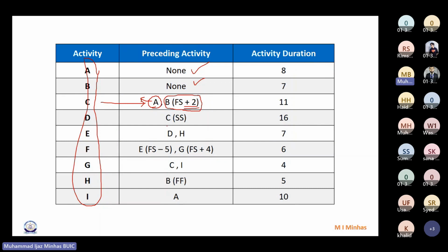Okay, so that means when we introduce a delay between 2 activities, we refer to it as lag, and it is shown by a positive value here. And similarly, in this case, it's a negative sign with 5 days, that is a finish to start relationship. And this -5 is indicating that we have introduced a lead. And what do we mean by lead? Let's say these are 2 activities. Rather than starting it once the first activity is finished, I'm starting this activity 5 days earlier, or 5 weeks earlier, than the first activity is finished. Is it clear? Yes, sir.